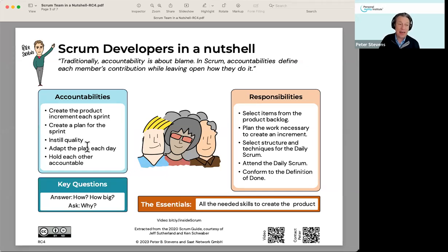Okay, now, as we go through the sprint, at the beginning of the sprint, the product owner comes with an idea what's going to be valuable, comes with some ideas, an initial sequencing of the backlog. And a lot of sprint planning is figuring out, okay, why are we doing this sprint? What's going to bring value? And when they've agreed on that, then you have what they call the sprint goal, which is kind of the overarching objective for the sprint.